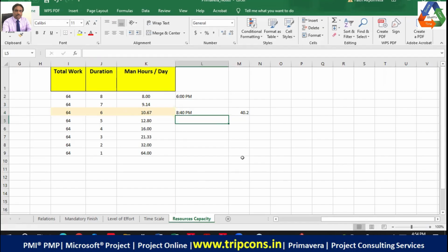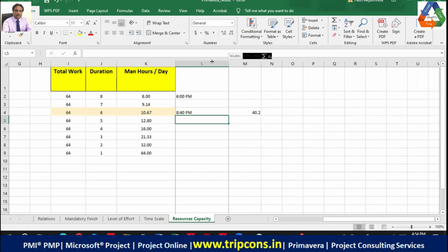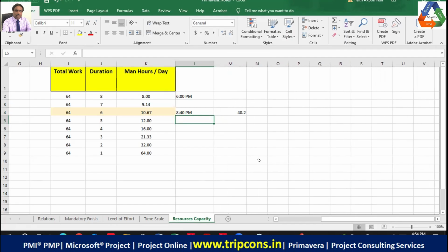We will not need extra people, but we will put in extra time. But we need some extra cash for two things. I say, fine, approved. So tell me what. They say we need some extra cash for the cab, right? And it will be like 350 per day for 6 days. So that will be adding up to 2100. And then we will need some money for the dinner. I say, fine. So how much do you need? We need like 400 per day for 6 days. So that amounts up to 2400, right?